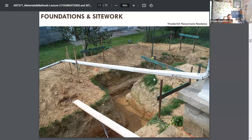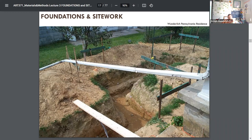You want to get water out of your trenches — that's a big problem, even in places it doesn't rain much. When I was working for a developer in San Diego, I put liquidated damages in a contract — meaning if they're not done on time, they pay a penalty — and the contractor would call at six in the morning saying the trenches were full of water, looking for an allowable delay. That wasn't an allowable delay. Here in Pennsylvania we have a lot of water, so you use drain pipes and put up tents.